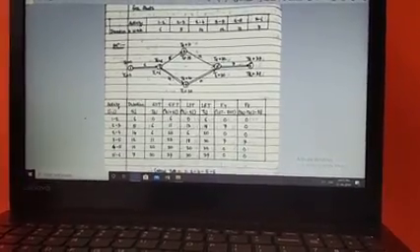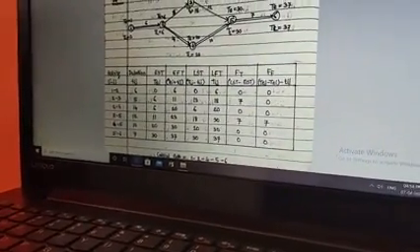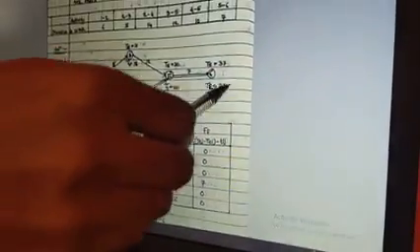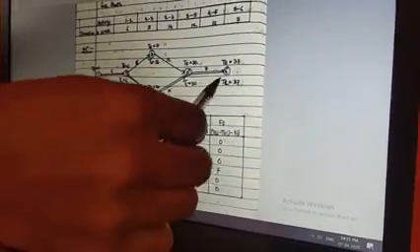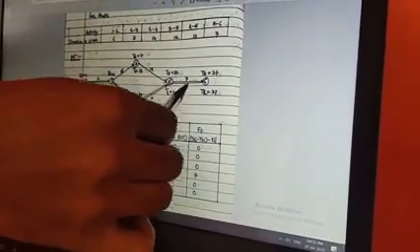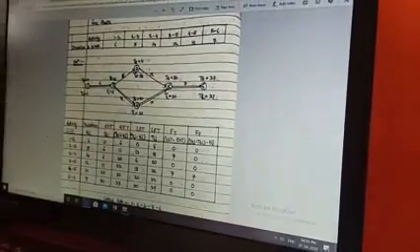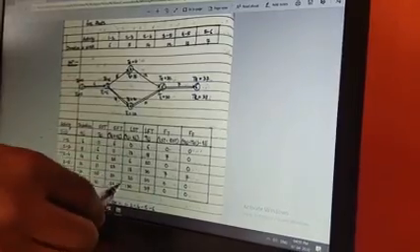So first I am going to consider the last activity, 5 to 6. Here in this 5 to 6, what is my total time or total duration? What we have calculated is 37. So if I want to calculate the LST for this activity, the simple thing I have to do is just deduct the duration for this particular activity from the total duration. That is 37 minus 7 is equal to 30.